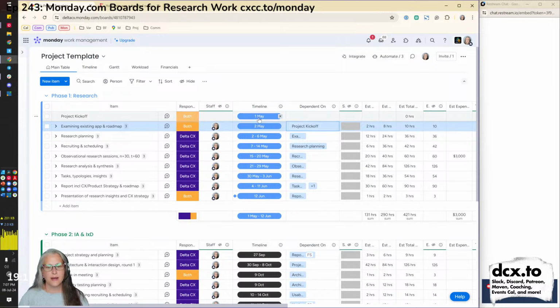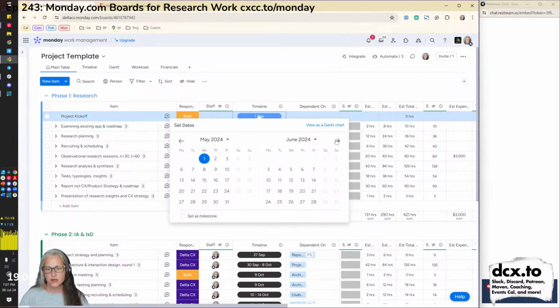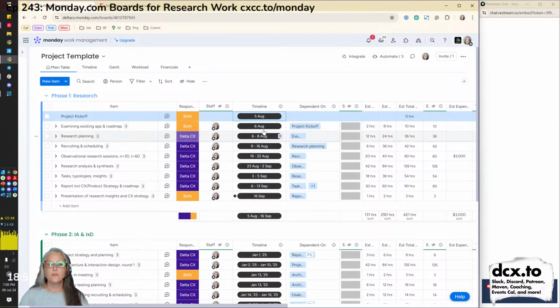The cool thing about it is, let's say the client says to me, you know what, we can't start on May 1st. We're going to have to move this date. So I can come in here and say, okay, the project kickoff is going to be August, Monday the 5th. Now watch what happens to my board. Boom! All of my dates adjusted. How? Why? Because I taught it where the relationships are.